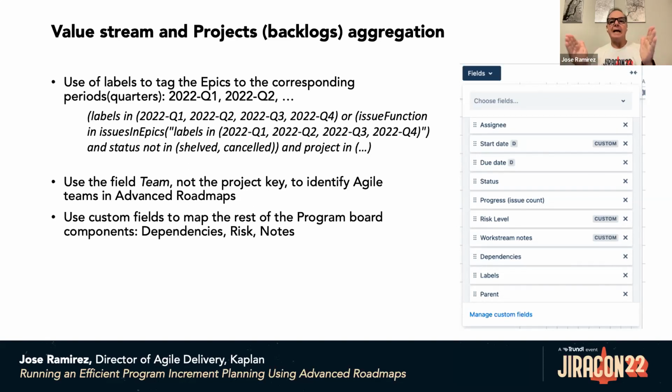So how can we do that? So only rollover issues. For example, we're planning for Q4. We're starting Q4 right now. Next week is the start of Q4, October, November, and December. In the program board for Q4, we want to see the new issues for Q4 and the rollover issues from Q3. So thinking about a good solution for that, we come up with the use of labels.